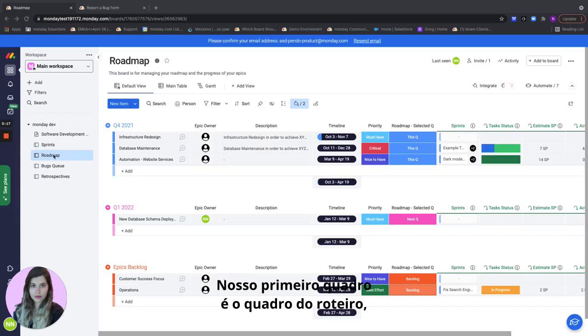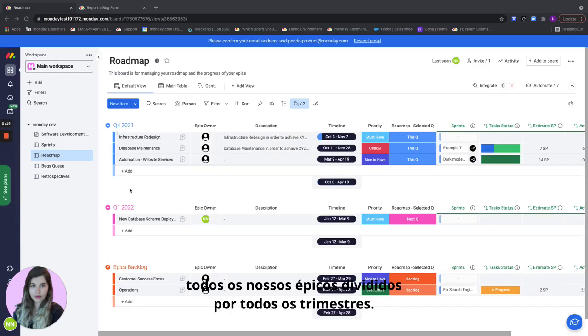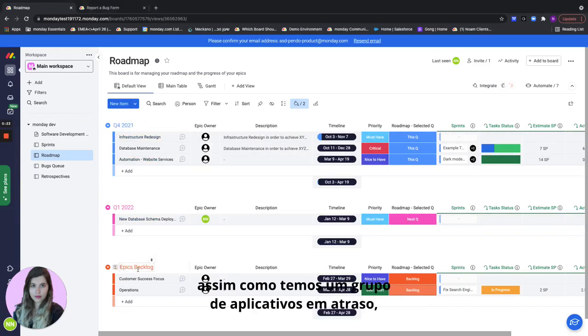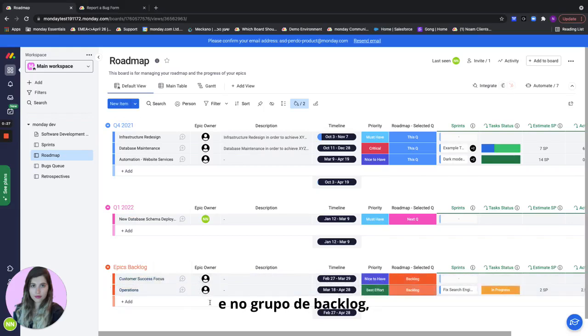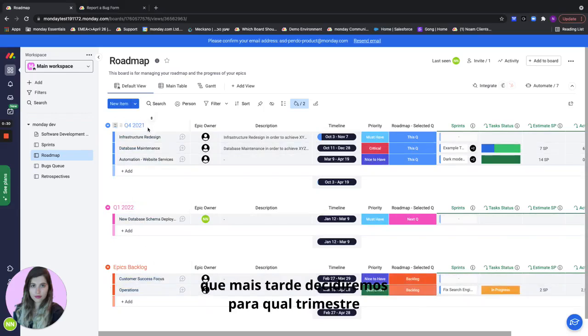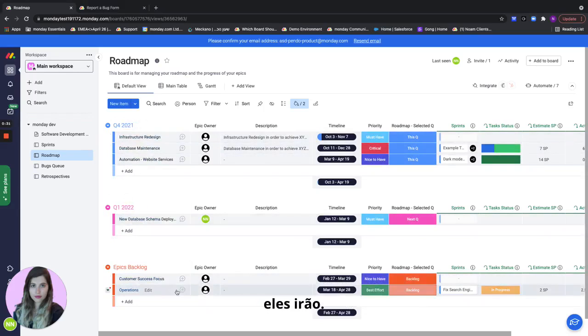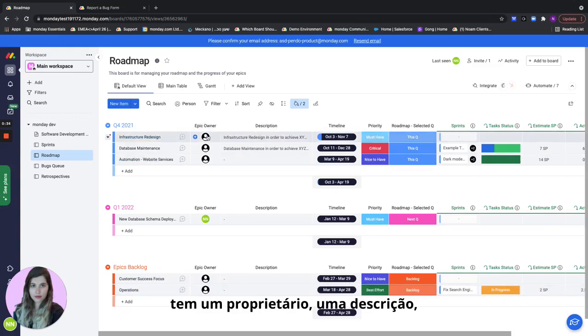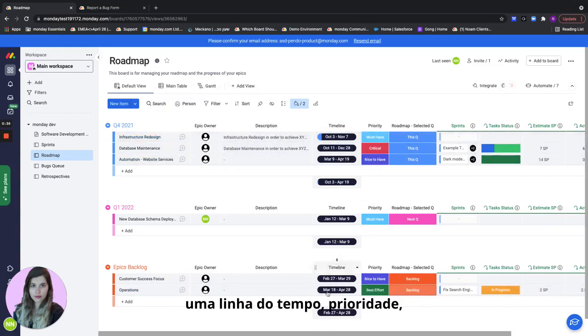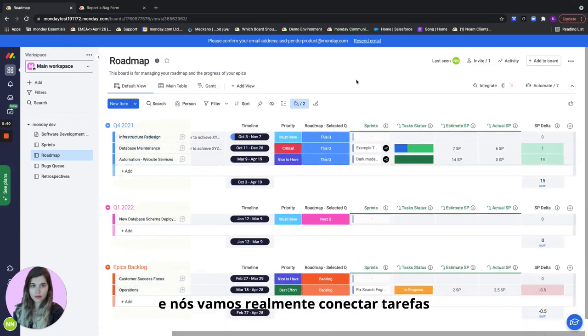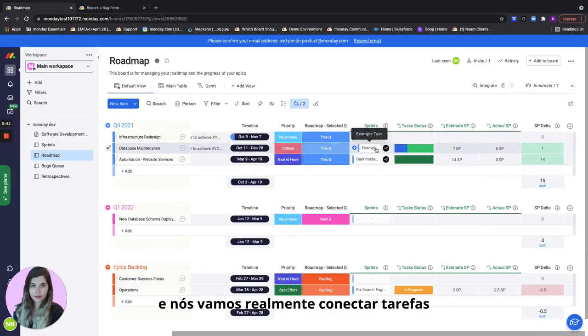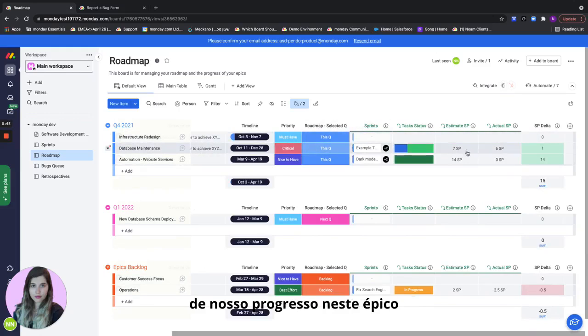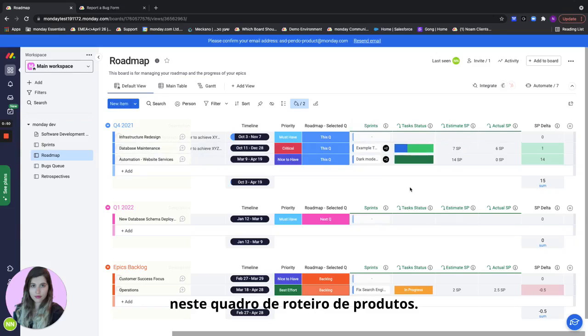Our first board is the roadmap board and this is where we'll see all of our epics divided by all the quarters. Our groups are quarters as well as a backlog group where we add all of our epics which later on we'll decide which quarter they're going to go to. If we take a look at one of the epics it has an owner, a description, a timeline, priority, which quarter it's going to go to, and we're going to actually connect tasks from the sprint to a specific epic so we can see an overview of our progress on this epic on this product roadmap board.